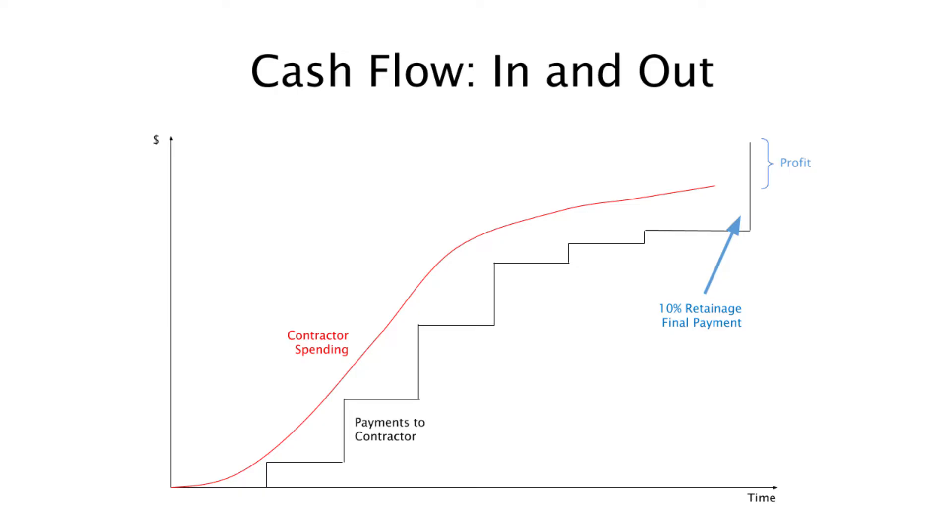I don't want to get into the details of legalities here, but I found that in some parts of the world, mainly the Gulf areas—Saudi Arabia, UAE, and Qatar—those countries have slightly different rules. In the beginning, they give the contractor an advance payment, which is a big amount. Also, the retainage or retention amount, which is 10%, half of it is kept with the owner until the warranty period is over, which is usually 400 days. So that adds more time value of the money.